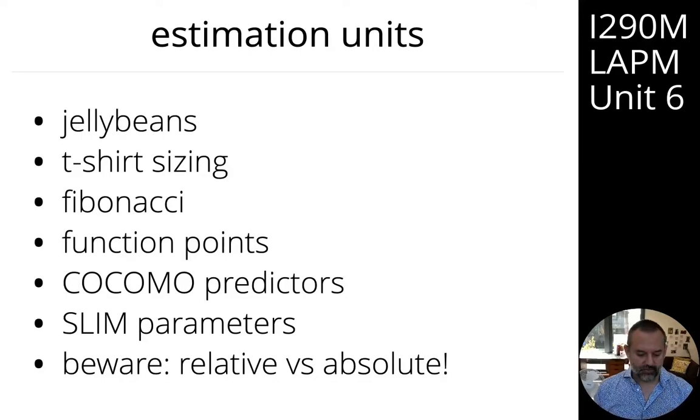You want to start by saying, well, this story, that's pretty small, and this story is pretty big, and then you shuffle around stories in between the kind of smallest thing and the biggest thing, and then you kind of group them into small, medium, large, or 1, 2, 3, 5, until you get to the end. And anything that you think is going to take more than a few days, you're going to break that down into smaller bits.